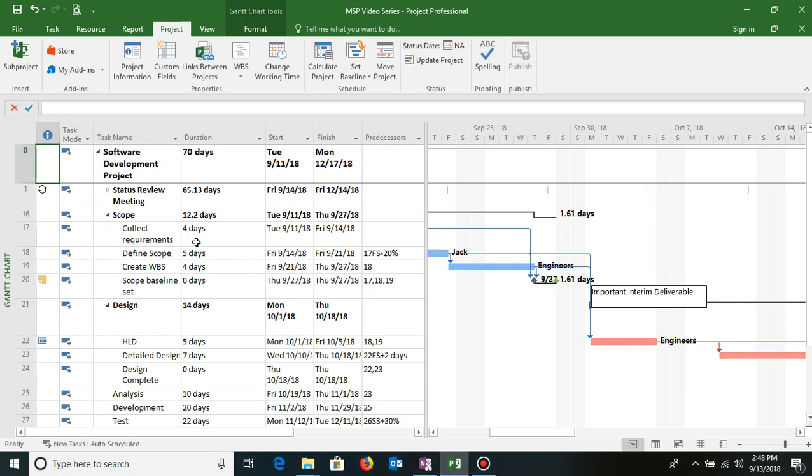Once you have reviewed all your cost, your resources cost, your duration, start and finish, then it is time to get the plan approved before you start executing. To get the plan approved means you set a baseline for the project. Now to set a baseline, we'll go to the next topic. We'll touch upon how to set a baseline for your project. So in this topic, this is what we wanted to discuss: how do you format and review your project plan briefly.